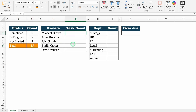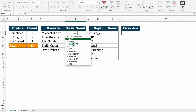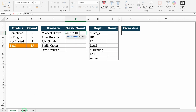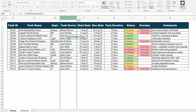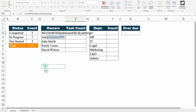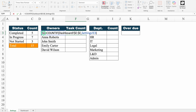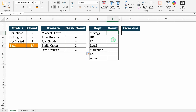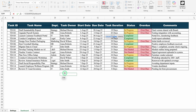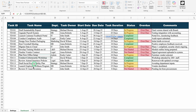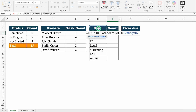For Owners and their task count, I will also use COUNTIF. Equal to COUNTIF, bracket open, Range: I will go to my dashboard and select all the task owners from top to bottom, press F4 one time to lock the range, comma, Criteria: go to Settings sheet and click on the first owner. Close bracket and hit enter. We got total count of owners. I will drag this down. For Department and their count, I will also use COUNTIF — equal to COUNTIF, bracket open, Range: go to dashboard, select all the department column, press F4, comma, Criteria: go to Settings sheet, click the header, use the down arrow key to come down. Close bracket, hit enter. I will drag down the formula.